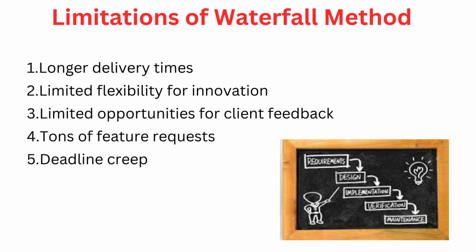So the customer has to wait a long time to see what exactly the developers are building, and to know that it meets what the customer really wants. The method has very limited flexibility for innovation. Waterfall expects all the requirements to be captured and documented in the requirement stage, and thereafter no changes to be accommodated. Because of that, this is not suitable for projects that don't know the requirements clearly at the start, such as a startup that tries to build a new and innovative software based on partial requirements. That is not possible with the waterfall method.